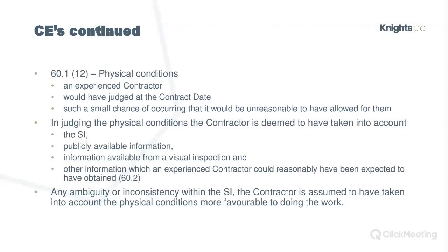We mentioned compensation event 12, that relates to the site information. So that is the relevance of the site information. It's a slightly convoluted provision. What this is, you get a compensation event, so that trio of time, money relating to the time and your extra cost on site,